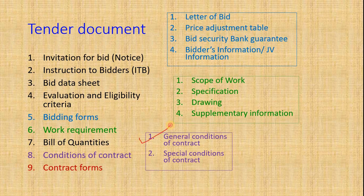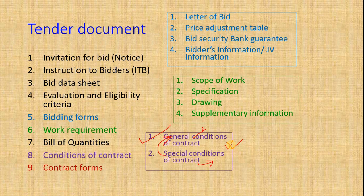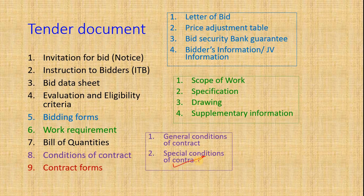Conditions of Contract: the General Conditions of Contract (GCC) are already available in the standard bid document and do not need to be changed. Special Conditions of Contract (SCC) are modifications to the GCC that vary from project to project. The SCC includes how much performance bond is to be deposited by the successful bidder, when work will start and end, how payment shall be made in running bills and final bills, and how advance payments shall be made. In case of a dispute, the Special Conditions of Contract are given first priority over the General Conditions of Contract.